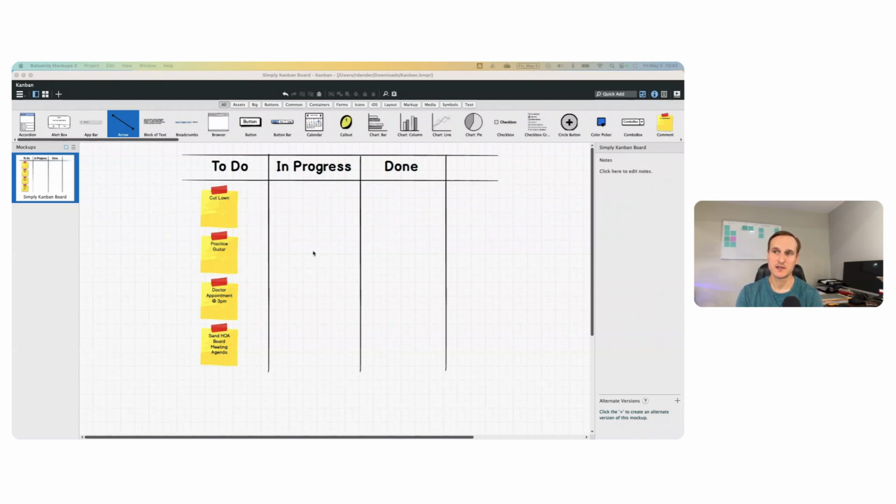Very important you have this in progress, because you want to limit, which we'll talk about in step two or part two, the amount of tasks that are actually in progress, allowing you to become more efficient. And we do have a really cool podcast on focusing on single activities or tasks versus multitasking.